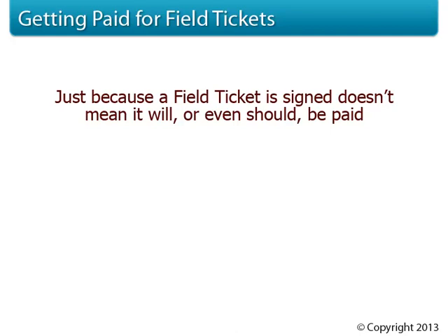GC superintendents are often taught to write, "This signature represents a verification of time and materials only," directly above their signature, and that's a good practice. Unfortunately, in reality, superintendents have been known to omit this important language when they're in a hurry and simply sign the documents as they're presented. The reality of field tags is that even if verification of time and materials only is not written by the superintendent, it is still implied.